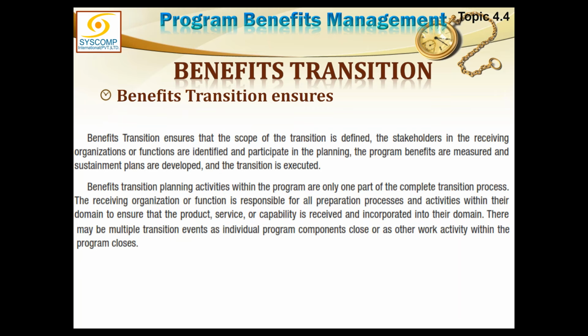Stakeholders in the receiving organization or functions are identified and participate in the planning. The program benefits are measured and sustainment plans are also developed and the transition is executed. So we can have sustainment plans according to which we are training the people, we are educating them, we are giving training on job so that they can sustain the benefit later.